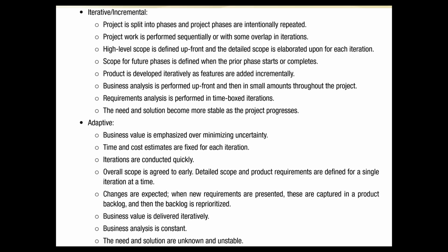If this phase is say 6 months long, then again we are not being very flexible. Any request from a stakeholder will have to wait at least 6 months before we can tell him whether we can do it or not. So in Agile, we are not making that big a phase, a 6 month or 3 month phase. Number one, we are shortening the size of the phases, and number two, we have stopped depending upon the product, and started depending on the time. We fix the time for every sprint, say 2 weeks. Whatever we can do in 2 weeks, we'll do it and then report. Then we'll start the next 2 weeks. Whatever we can do, we'll do it and then report.